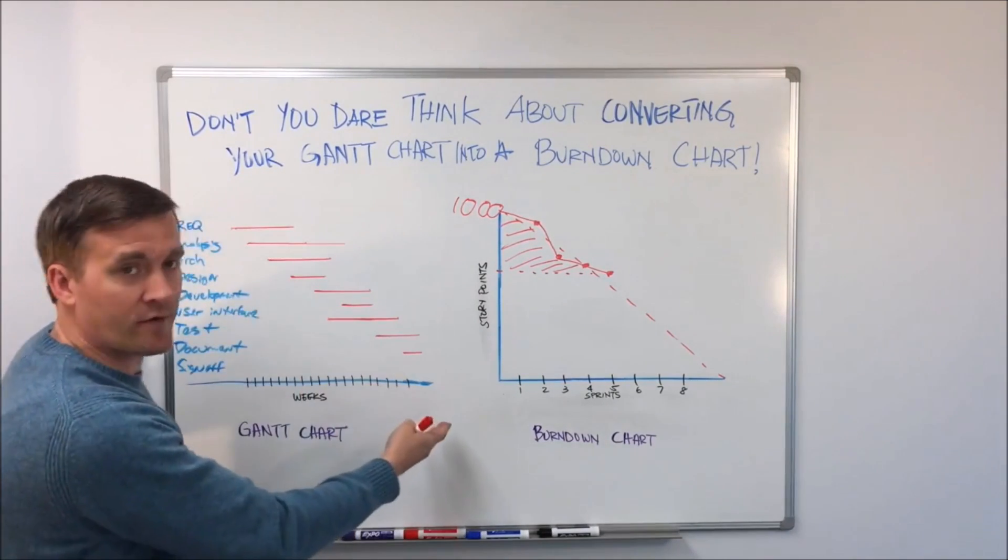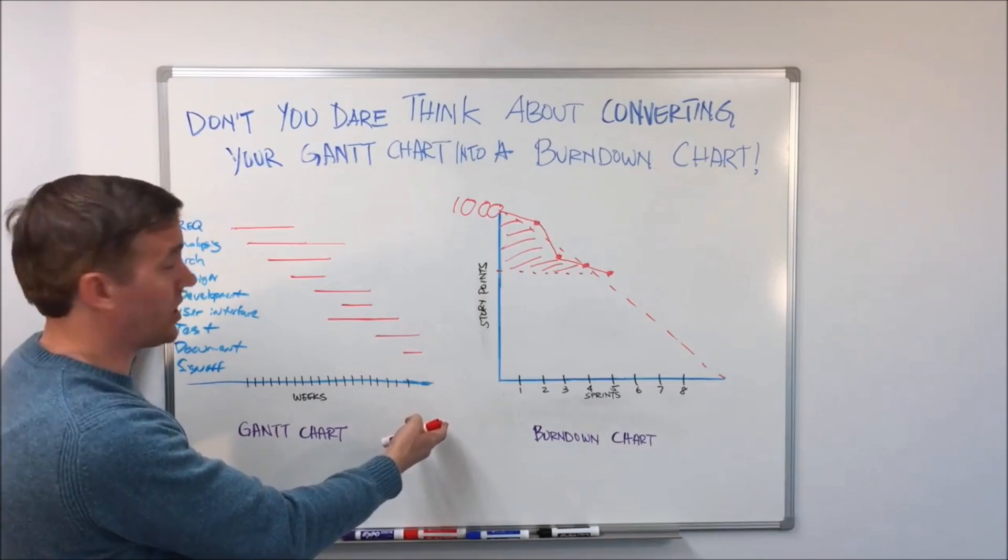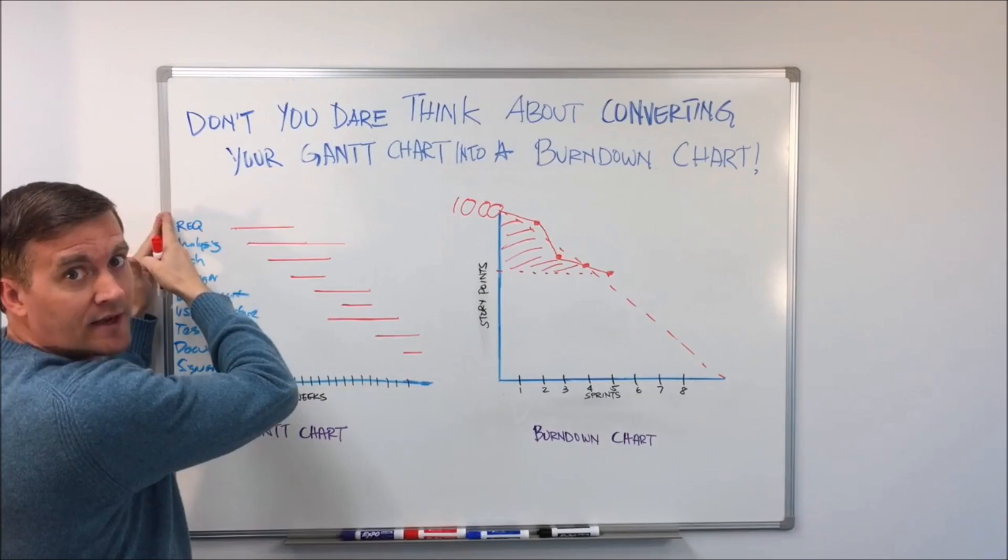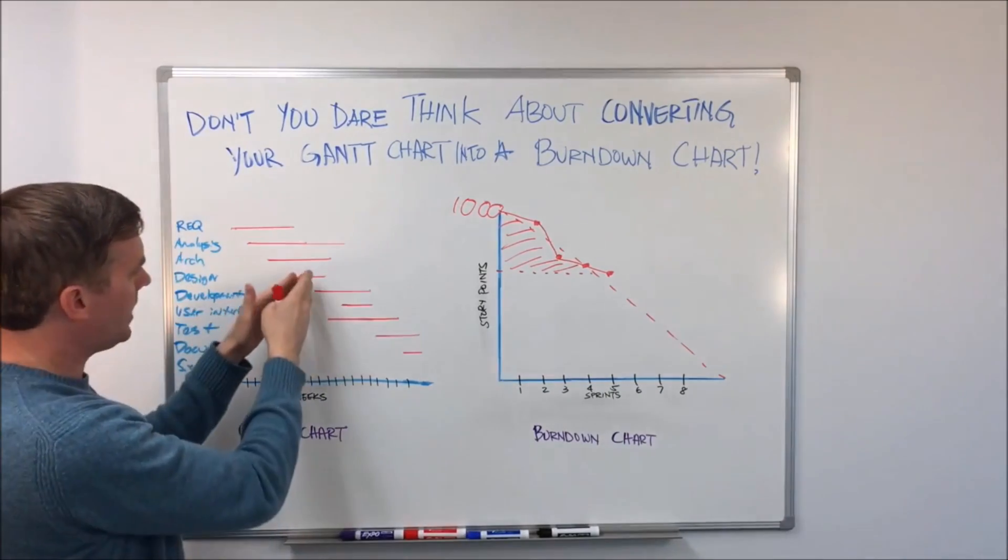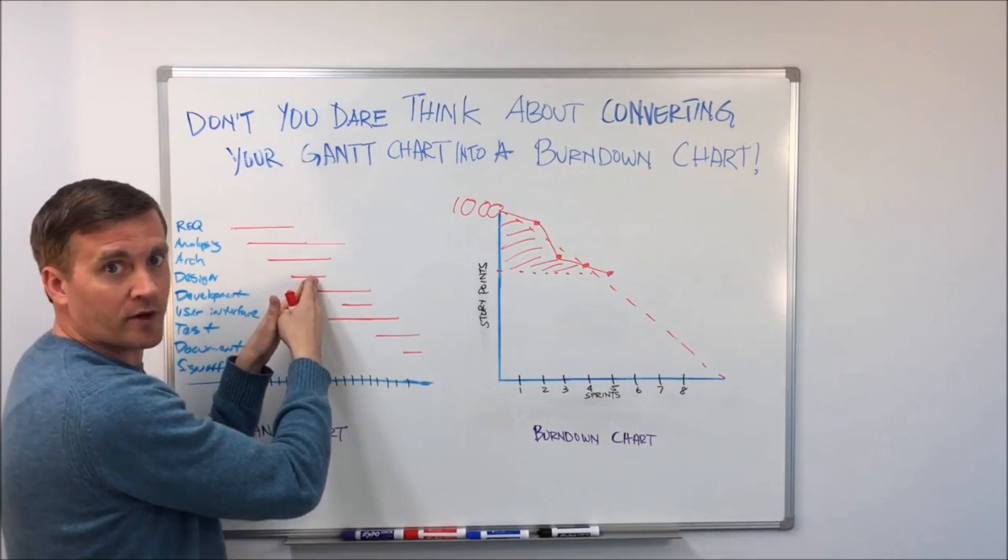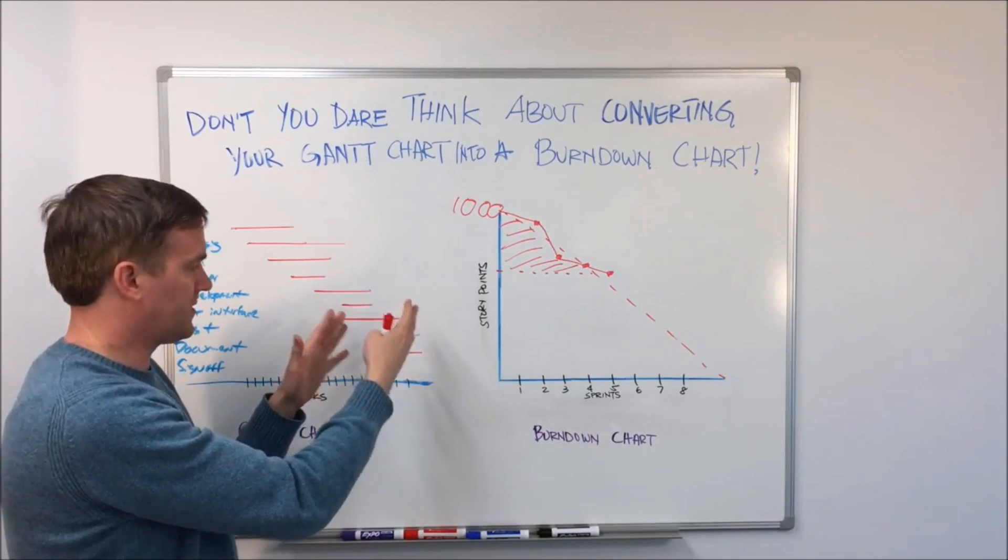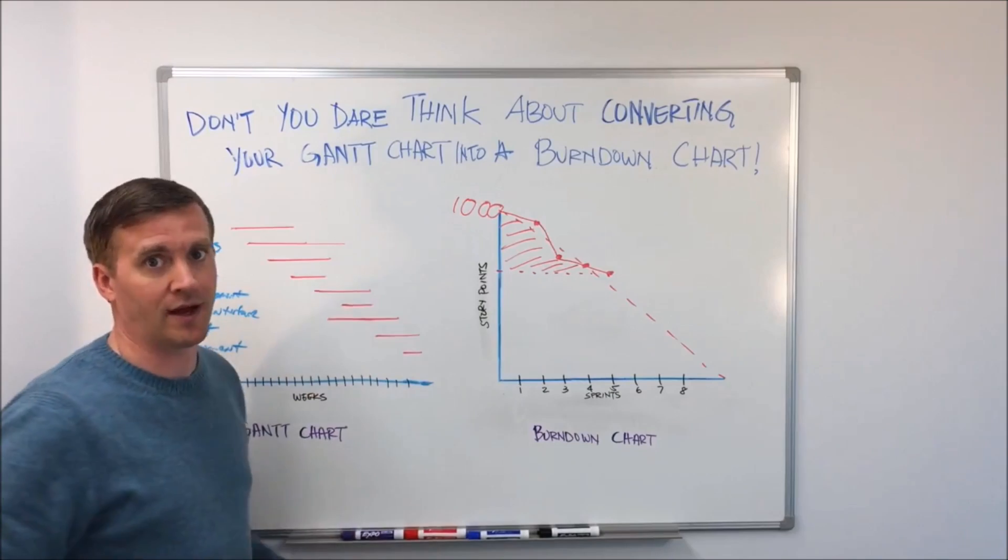In a traditional waterfall project being managed by a Gantt chart, when you get to this same point, all you have is a whole bunch of unfinished work and a lot of documentation. You don't really start getting into finishing the work until you're in the development, the testing, and the deployment phases of a traditional project.